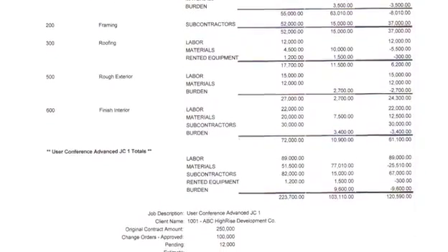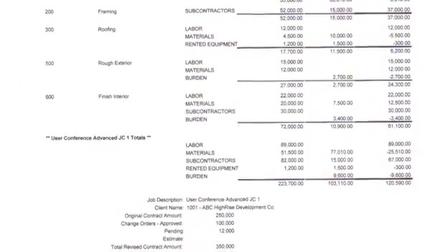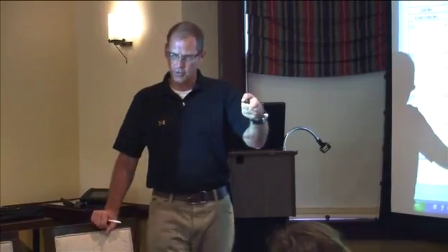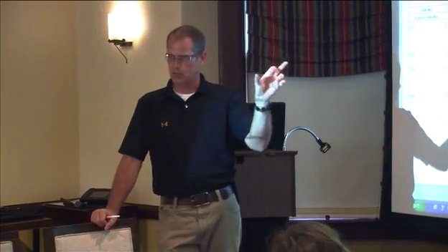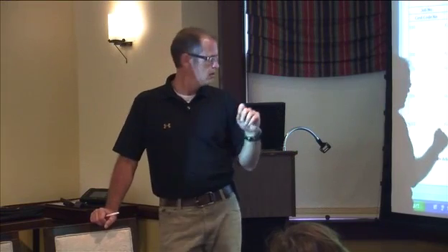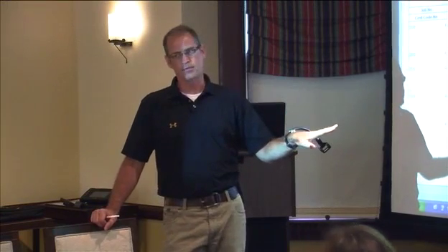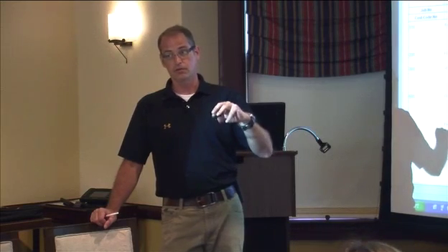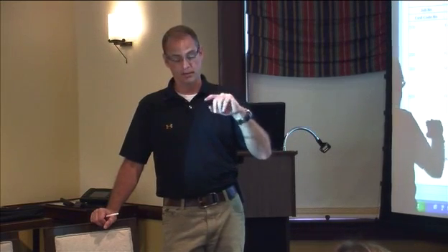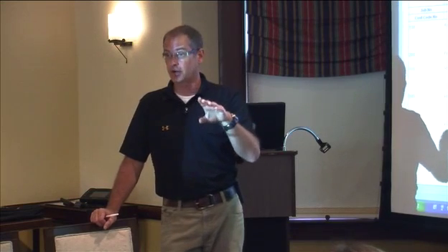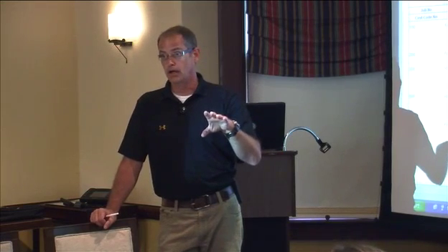So when I post my material expense and it comes in through an AP invoice, if I've got it on a purchase order, this is probably already designated to what cost code and job it's going to go to. Labor is coming from time cards. Lots of advancements in the field recently with electronic time card systems and electronic entry.